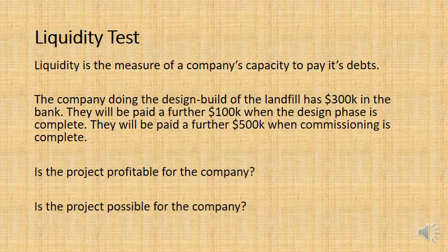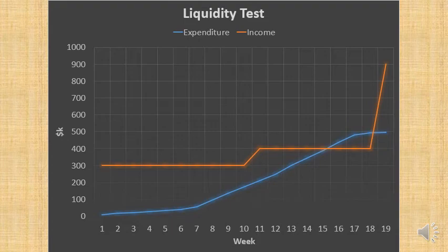This is basically a line graph where we're comparing expenditure, meaning money that we have to pay, alongside the money in capital that we have on hand. So let's look at this on the graph. So that blue line, that is the expenditure line. Remember that is the line that we saw beforehand. That is that S-shaped curve. That is the cumulative budgeted cost throughout the 20 weeks.